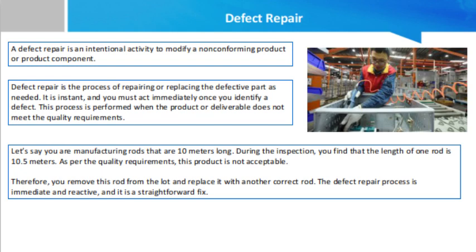First, the project team must assess the situation and make a careful determination as to whether or not the specific defect within the component can be repaired. If it is unable to be repaired, then the component must be replaced entirely, usually but not always the more expensive option. When a determination is made as to whether the component should be repaired or replaced, a recommendation typically must be presented in writing to either the project team or the financially responsible party.